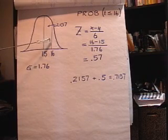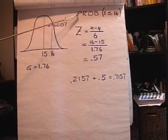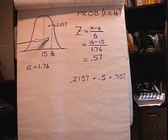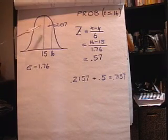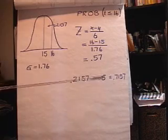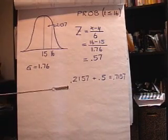So, then, finally, to answer the question, the probability that the total time is less than 16 is this area plus this area, which, of course, is point two one five seven plus the point five to get 71.57 percent.